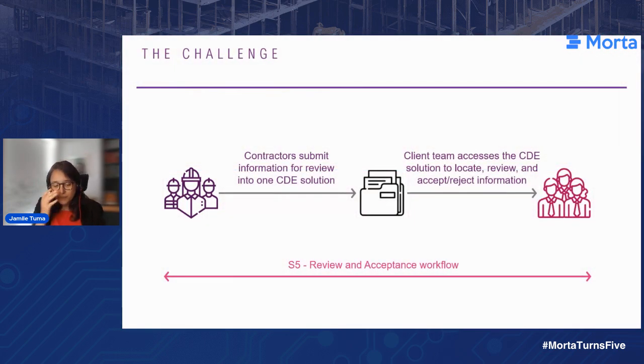So, from a technical advisor point of view, we are really working client side a lot of the time. The review and acceptance workflow is a very fundamental activity we have in a project. That's the S5 workflow, when we have to, on behalf of the client, accept or reject deliverables, review, provide clarifications, or ask for clarifications. That is a very fundamental part of our job.